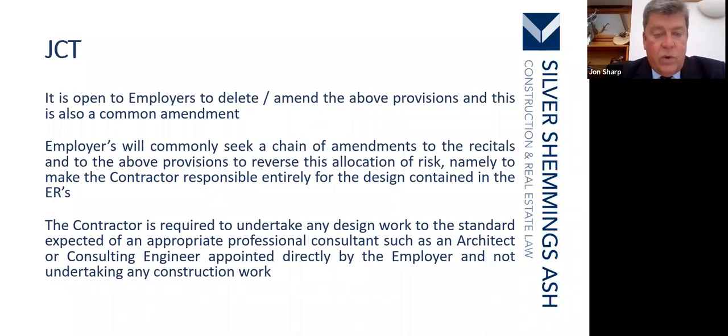The contractor is required to undertake any design work to the standard expected of an appropriate professional consultant, such as an architect or consulting engineer appointed directly by the employer and not undertaking any construction work.